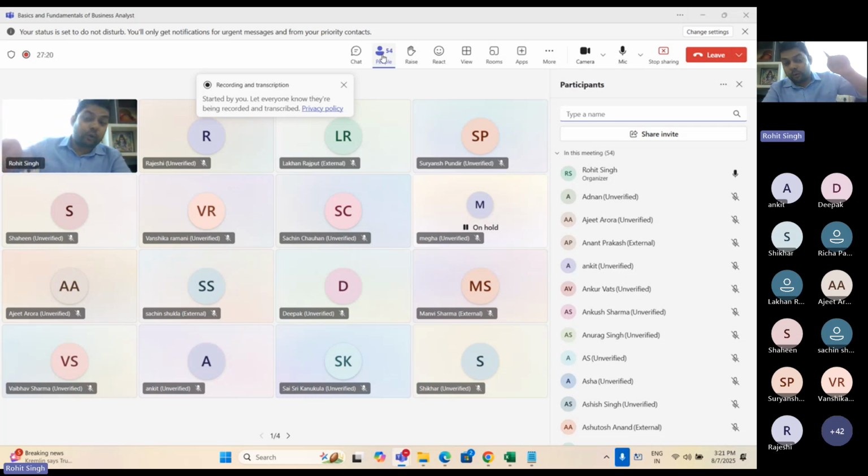Then the quotation comes in the project planning. In project planning, we do the work breakdown structure, where as per the billable hours, as per the production hours that you have allocated to us, we do it in such a way that we can earn our profit, distribute salary to all project team members, keep a buffer, keep penalty and constraints budget, so that if it requires more time and more budget, we can accommodate.